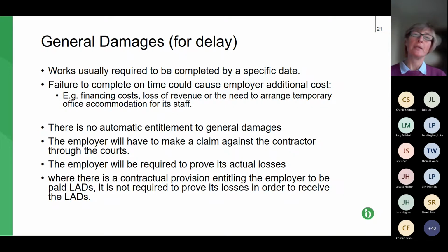But equally, if a subcontractor's delayed, it's got people on site, which it probably had plans to divert to a new project. Lots of plant and machinery on site, all costs money. So that's why delay is important in every contract, but it's probably more important for construction contracts.